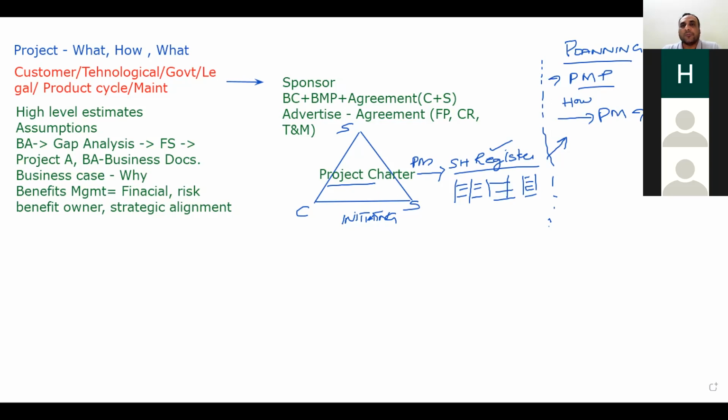So when we go to the PMO and ask them to please release the resources, they will ask, sir, where is your charter and your name? He will issue this charter to them, and ultimately the PMO will start releasing the resources on an as-needed basis. You don't need all the resources at the start because we will work with the concept of just in time resources. When the PMO releases the resources, the same thing as I said on the first day, there will be the project managers and here will be the resource managers. And if required, we could have externals like the customer or sponsor.